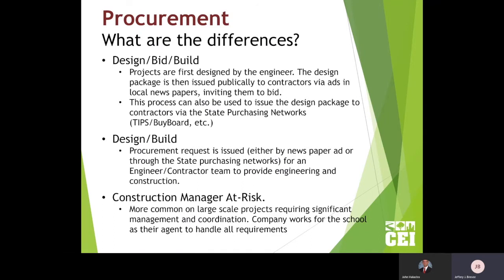Say the difference would be a full stadium where we're building buildings and parking lots and who knows what goes with that, versus let's just go convert the grass field in the existing stadium over to turf. Well, that would not be a good situation for a CM at risk, or a construction manager at risk. Much better suited to those first two options, design, bid, build, or design build. So a little example there.